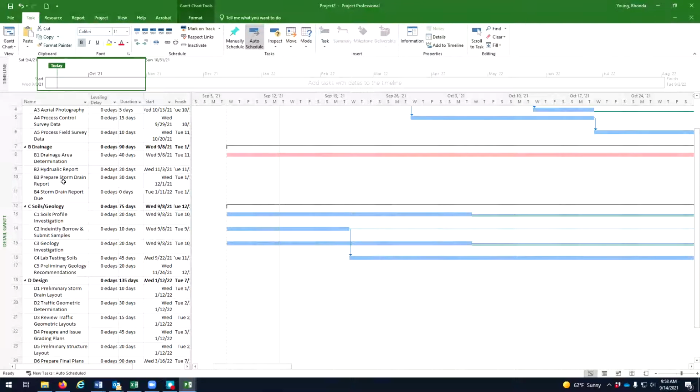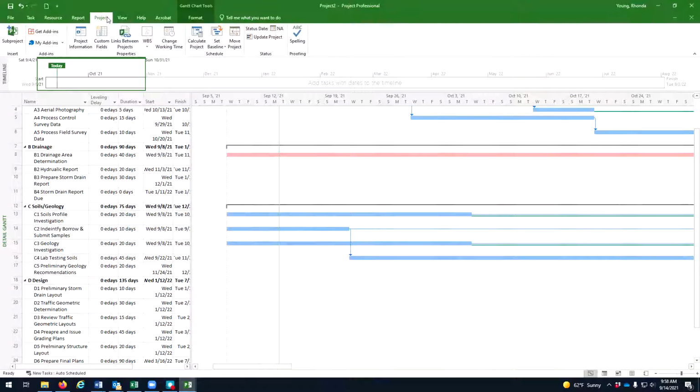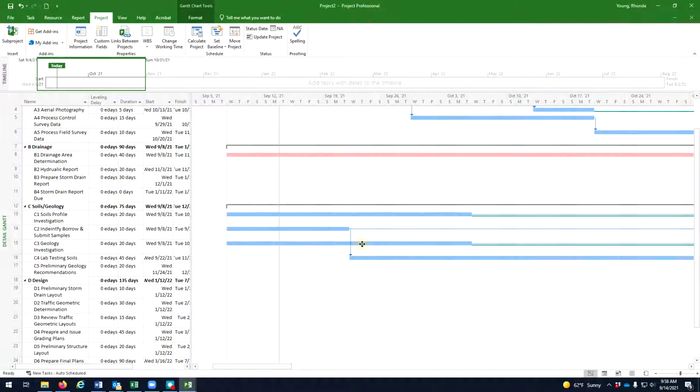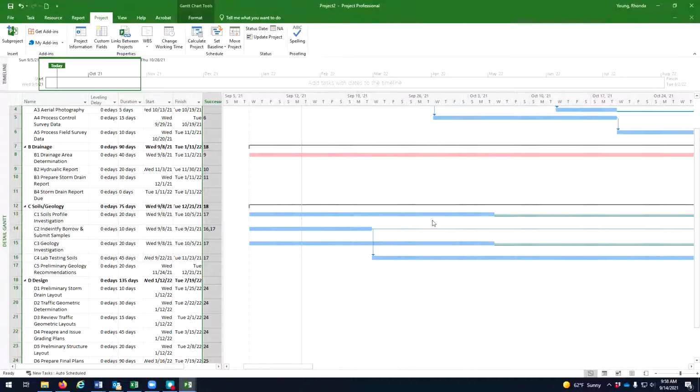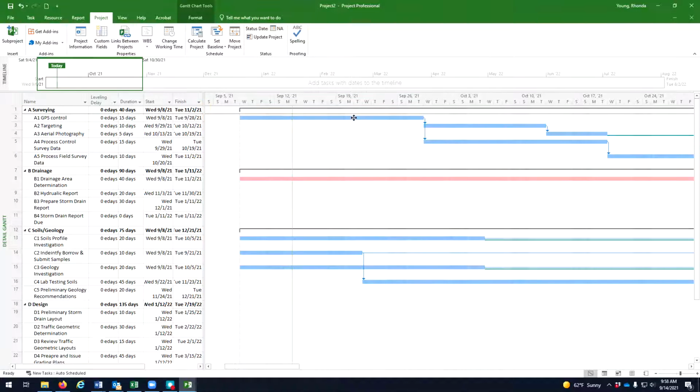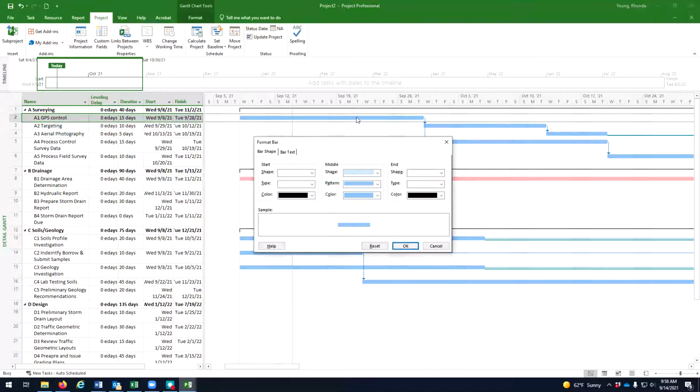The other piece that I wanted to talk about is what's called setting the baseline. So when you do this project and set your schedule for the project proposal plan, then you're going to execute the project over the academic year. When you have the final schedule that you've put into your project proposal, you want to go ahead and set the baseline. Now, come December when you're doing a status update, there are a couple of things that are really helpful for showing where you are on the project. One of them is % complete. So if I hit